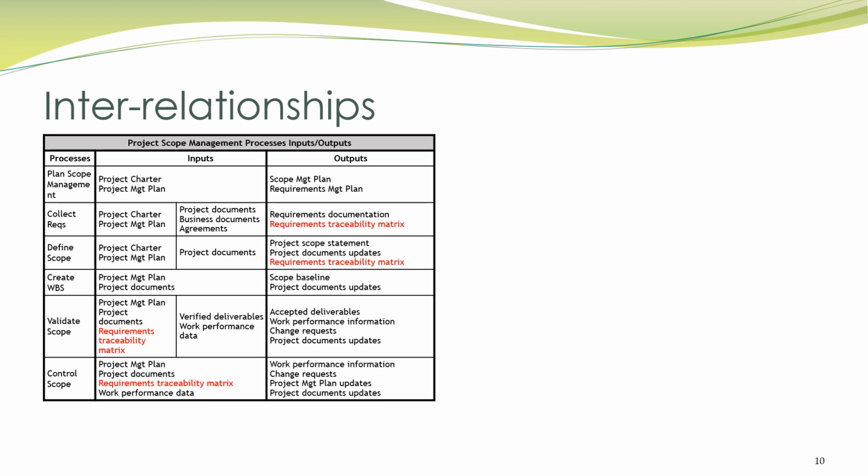You will use the requirements traceability matrix to keep on top of the requirements. The list could be lengthy, after all, not just whether they are being worked on currently or have been completed or are in the backlog, but also who is responsible for each requirement. The last use is to manage product scope. New requirements that are not on the list need to be handled through a change order procedure.